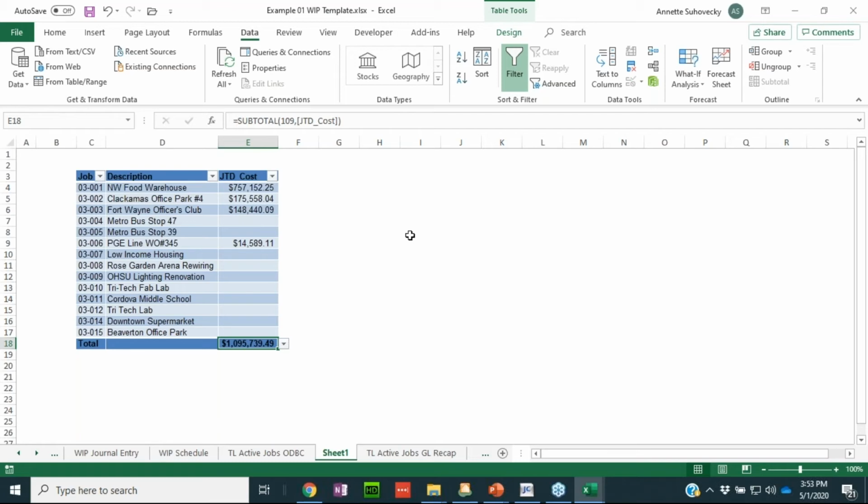The reason is that job to date cost also includes future costs. This particular field doesn't stop accumulating based on your current job month end. It keeps accumulating. So in order for you to get the job to date cost for accounting purposes, I have to make sure that, if I'm trying as an example to reconcile to the end of April, nothing is posted in May so far that has increased that job to date cost number.